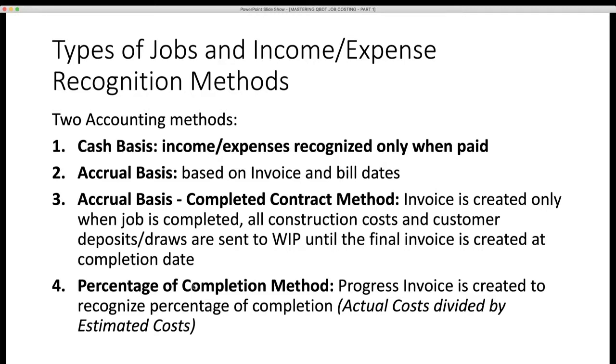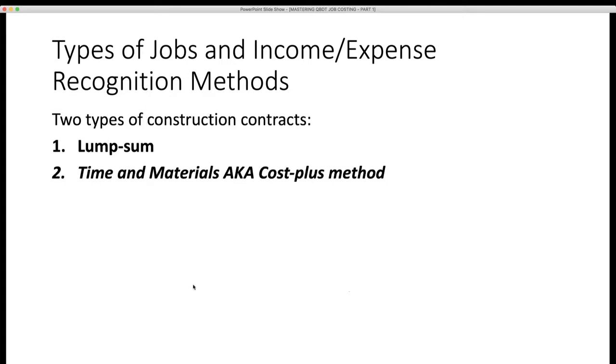spectrum. But when you choose what accounting method you use, normally these little construction companies don't really care too much about the items and double-sided items because they're going to be working on cash basis. But once you're going to get into accrual basis completed contract method and percentage of completion method, which we'll cover both through our examples, you really want to pay attention to those double-sided items.